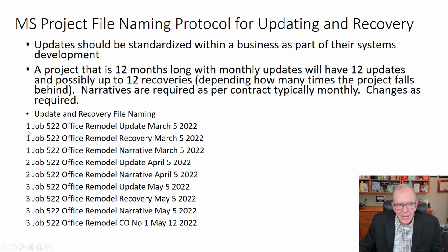We would name that. And usually again, you can come up with different sort of layouts for it, but I kind of wanted to have an example for you. And this is what I usually do with my clients and students. So I usually put a number, like 1. And this would be the first update in the project. And then you put the date. You put the job name. You put what the name of the project is, right? And what are you doing?